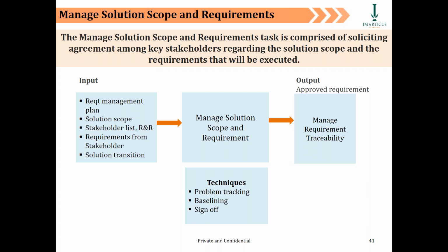So today, as a solution architect, for example, I create solutions for the clients, and I tell them, okay, guys, this is a 1,000 man day project and it will cost you $1 million. And they agree to it. It gets formed into a project contract. Fine. I send the contract to, let's say, you, Rishabh, because you are now the operational lead or project manager who is going to implement this for the client.